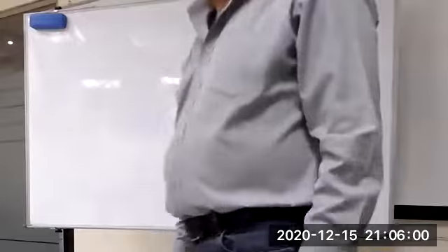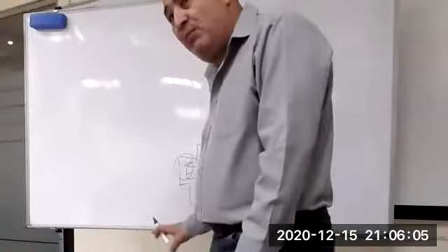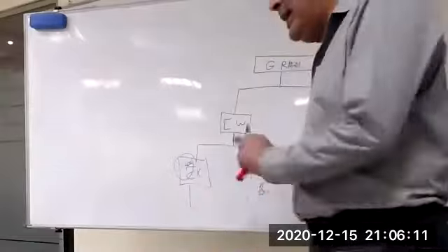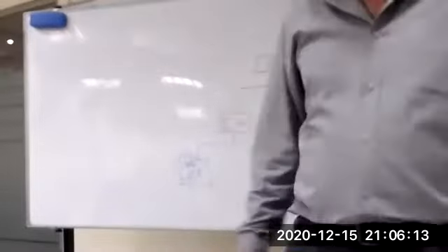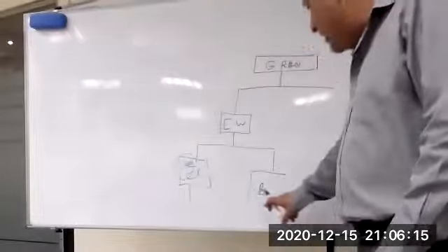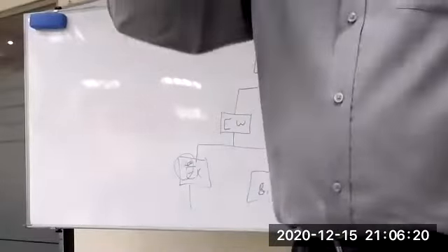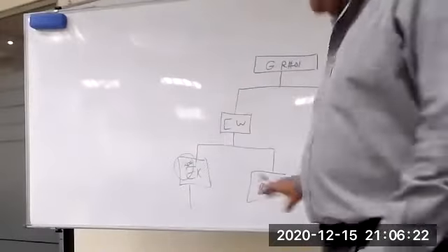This is what you need to know for your exam. Start from the lowest, bottom up, and assign to each of the 4 work packages. For each work package, I take whatever activities are below it and calculate the resources, budget units, and unit rates, multiply them, and make the budget cost for this one.